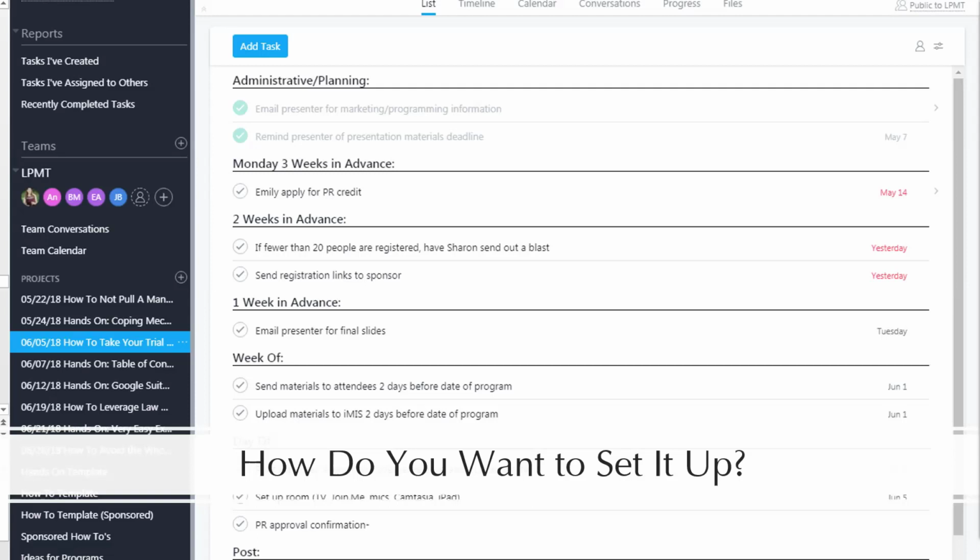This particular one was the one that we established that I told you took a while to figure out. When I was at the Chicago Bar, we did a bunch of webinars every other week. At first, we tried to do a template for every type of webinar. And then we realized that if it was a sponsored webinar versus a regular webinar, it had different steps in it. So we went through and created templates for different, very discrete types of projects. Then when we created the project, we copied over the template, named the project by the date that it was due.